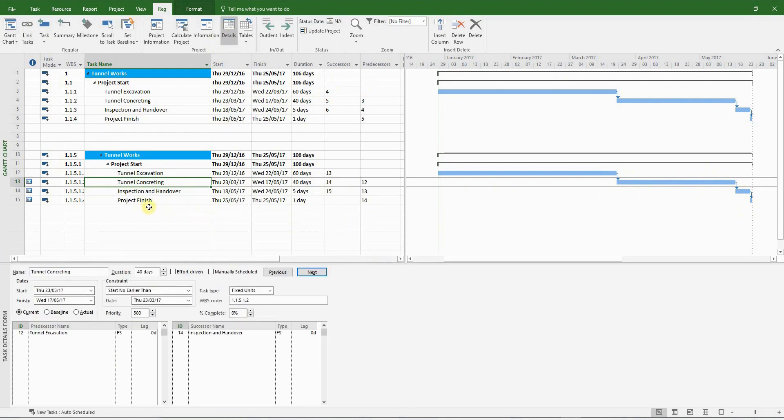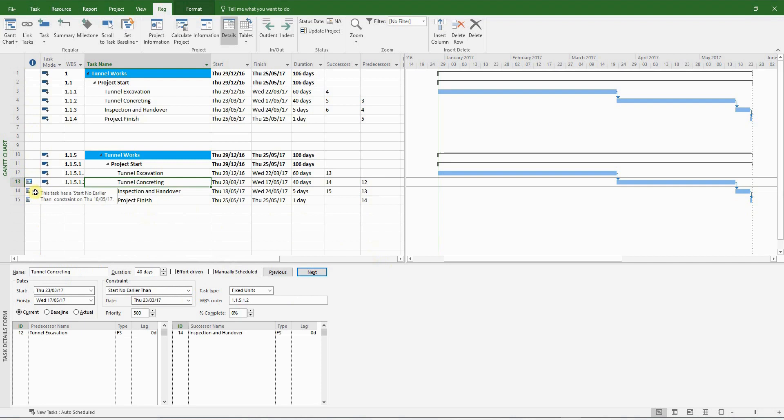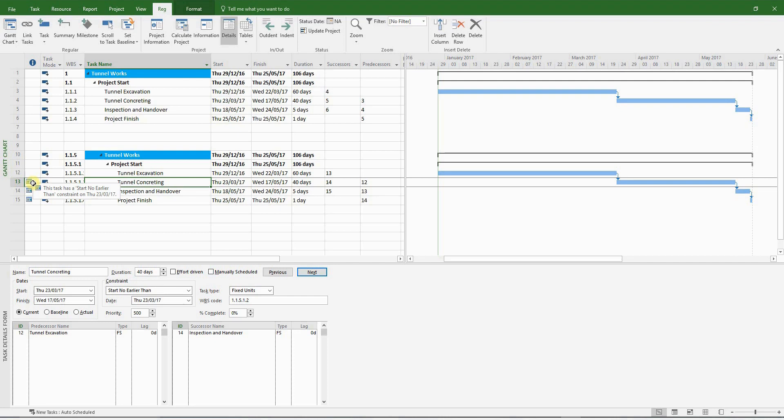You might notice here that there's a small icon in the information column. This stands for constraints. MS Project has a nasty habit of introducing constraints when you do certain activities within MS Project. It's generally a very bad idea to have constraints. It can wreak havoc on your analysis. So let's get rid of it. I'm going to highlight all the activities that have these constraints.